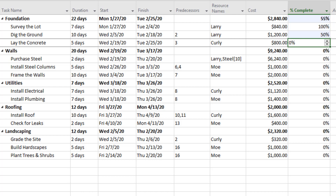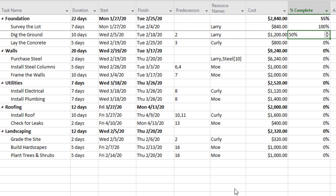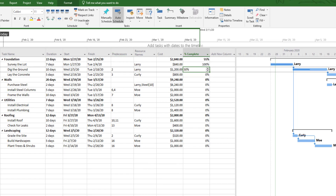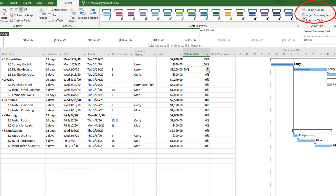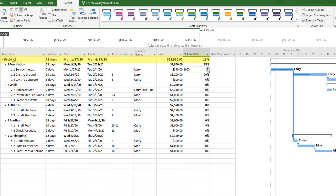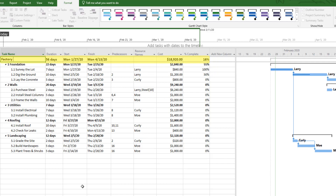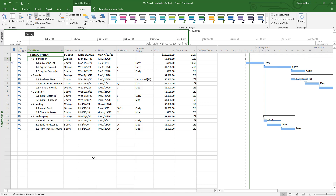One thing I notice is that costs and durations are only summed by category. What would be helpful is a summary at the top showing the costs and duration of the entire project combined. If I go to the Format menu in the Gantt chart tools section, I can click on Project Summary Task and Outline Number to get a summary at the top and to number all activities so they're easy to reference. At this point we've put together a pretty good schedule using the features in Microsoft Project that are probably used most often. I hope this was helpful — good luck on your projects.